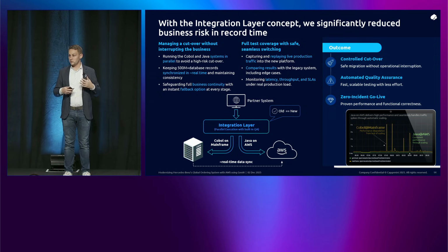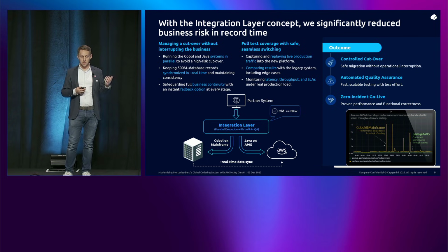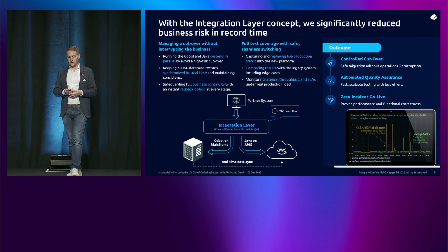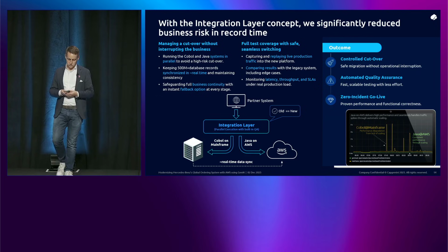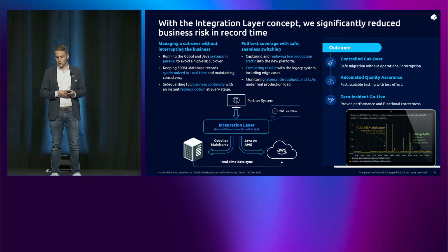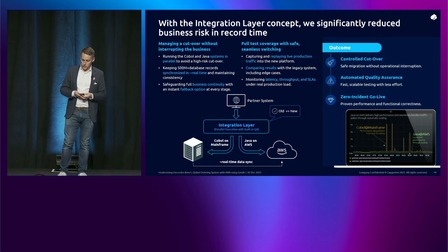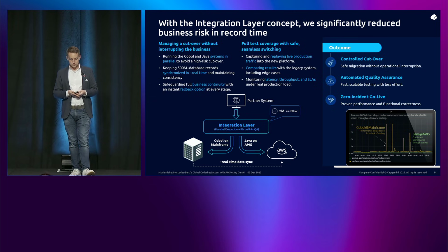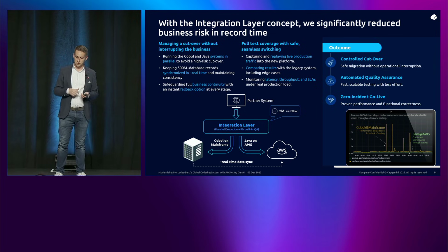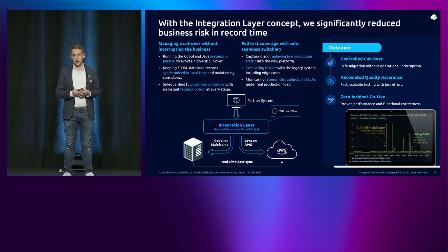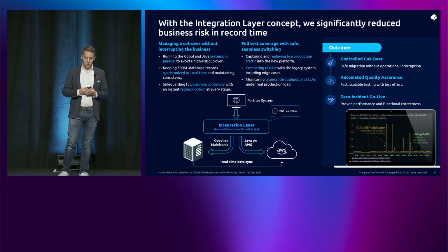We were able to capture real data and just run it against the two systems, and then go into production with a good check. And it turned out well in production too. As soon as we went live, we were also able to test both of the systems and compare all of those results.